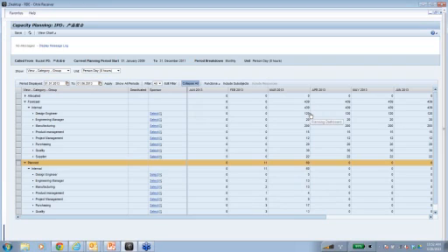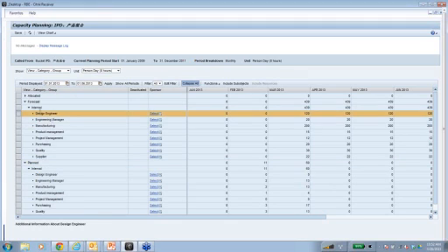So at the high level, when I'm planning 6 months out, you're going to plan for your designers for any of these portfolios or sub-buckets at this level. I'm going to say I need 120 man days of design engineers for March, for April, for May, for June, July, etc. And then you can compare to what your actual projects are going on.